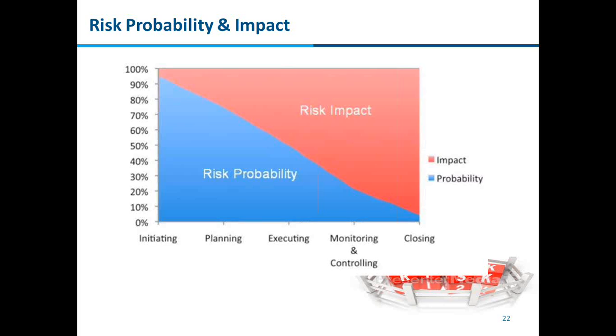Similarly, the impact is the reverse. When you are starting a project, you are not sure how much it would impact if there is any change or anything happening in the project. But the risk impact is very low in the starting, or initiating, phase of the project. As you progress, if any risk occurs, the impact of this risk would be higher and higher as we progress toward the closing phase of the project.